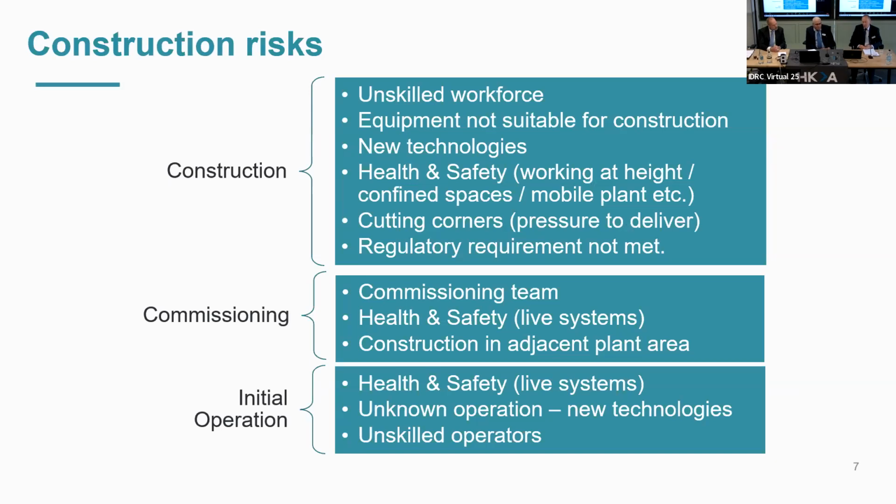I'm going to look at construction risks. I've broken it down into construction, commissioning, and initial operation. For construction, from my experience, sometimes you find that the workforce is unskilled and the equipment is not suitable for construction. This is particularly true for newer technologies, because you do have a skilled workforce, but sometimes you need a bit more skill.